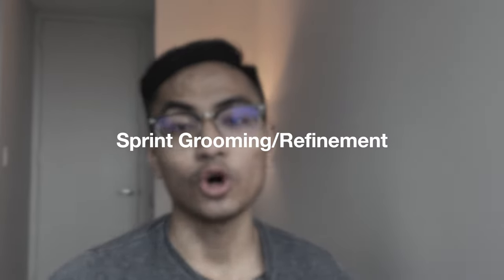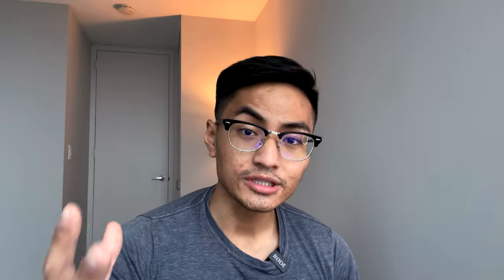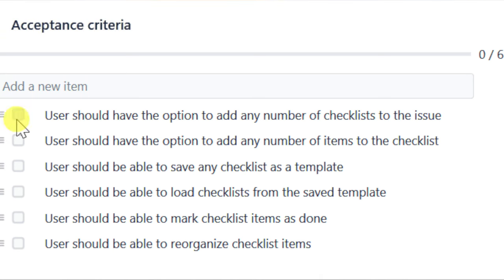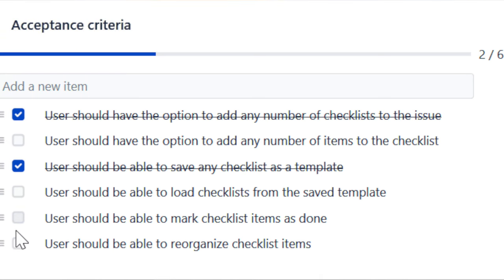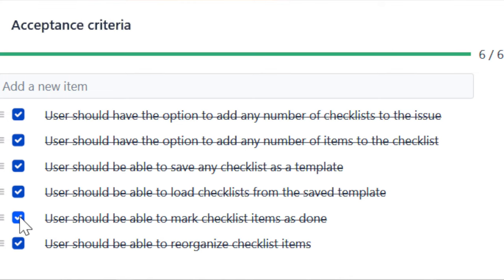The second meeting is going to be called a sprint grooming or refinement meeting. In this meeting, you're going to be talking about the scope of stories for the upcoming sprints. A story is agile terminology to describe the type of work you're going to be implementing based on the user's needs or functionality of the product. Also in this meeting, you're going to be adding or removing details about stories to prepare for the upcoming sprint, like adding or removing acceptance criteria, or adding or deleting testing requirements.